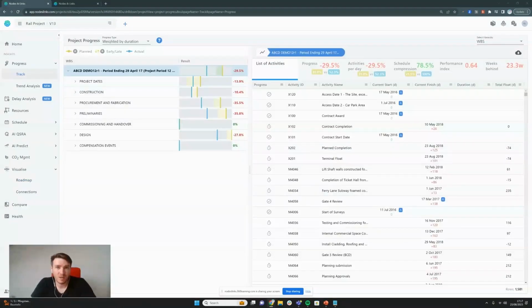One additional thing that we need to check to ensure that the schedule is of quality is how extreme the forward wave is. So we've all been there, where we can put detailed planning into the most recent period of time, but things near the back end of the program are at a much higher level just because, for example, design has not been completed. We can check that in the system.